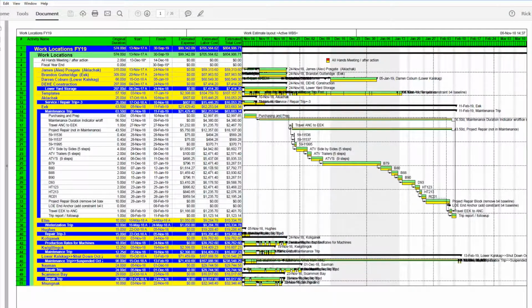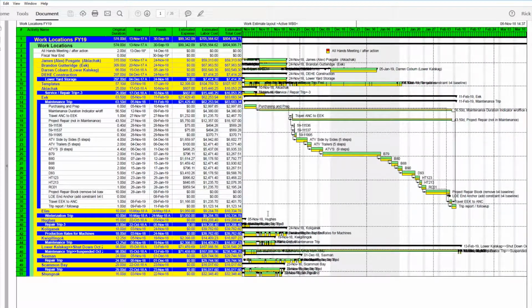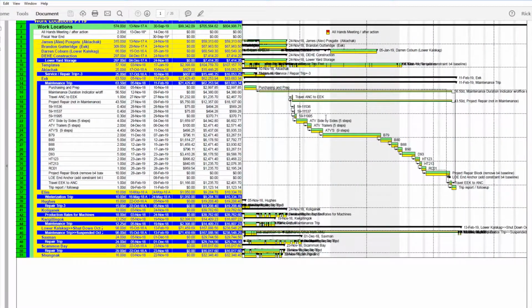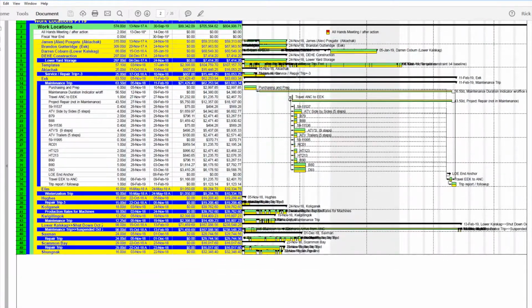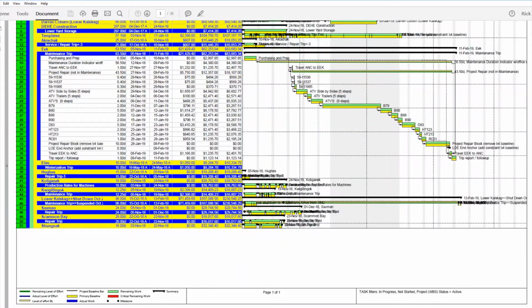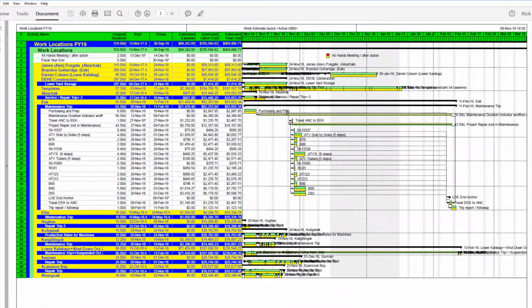This is the build out for this schedule. This is not at the point that you baseline it. You're not done building this schedule until you're at the point where you're going to use it. There's no more information to add. So here, when I'm at this point, and I'm not going to add any more information to it, and I'm not going to change anything else, then I create a baseline.